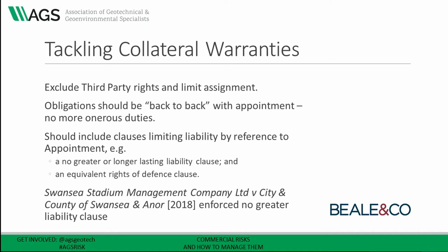Your obligations under the collateral warranty should be back-to-back with your appointment, so that the duties and standard of care required are no more onerous than in your appointment. The collateral warranty should contain an express clause limiting your liability by reference to your original appointment. These clauses include a 'no greater or longer lasting liability' clause — stating that you cannot owe the beneficiary of the collateral warranty any greater duties than you would owe to your client — and an 'equivalent rights of defence' clause, providing that you may use any defence under your appointment against a claim from the beneficiary. You can rely on all the limits of liability set out in your appointment and can raise any counterclaims.